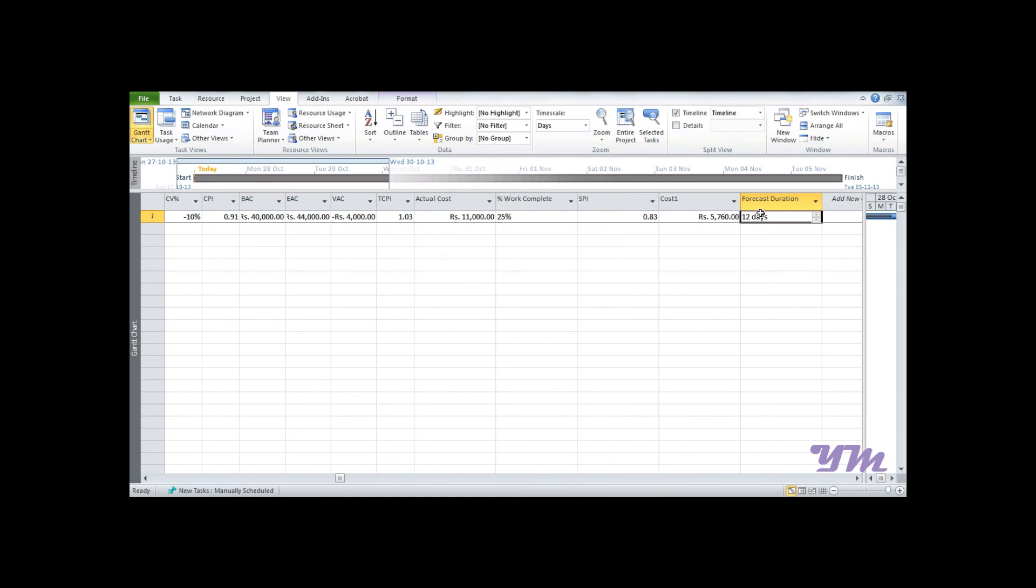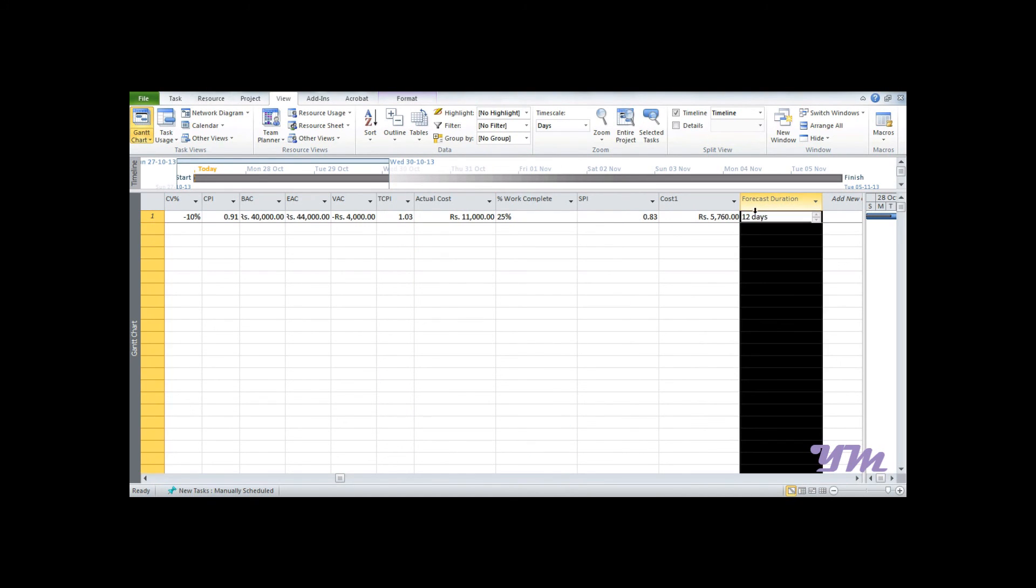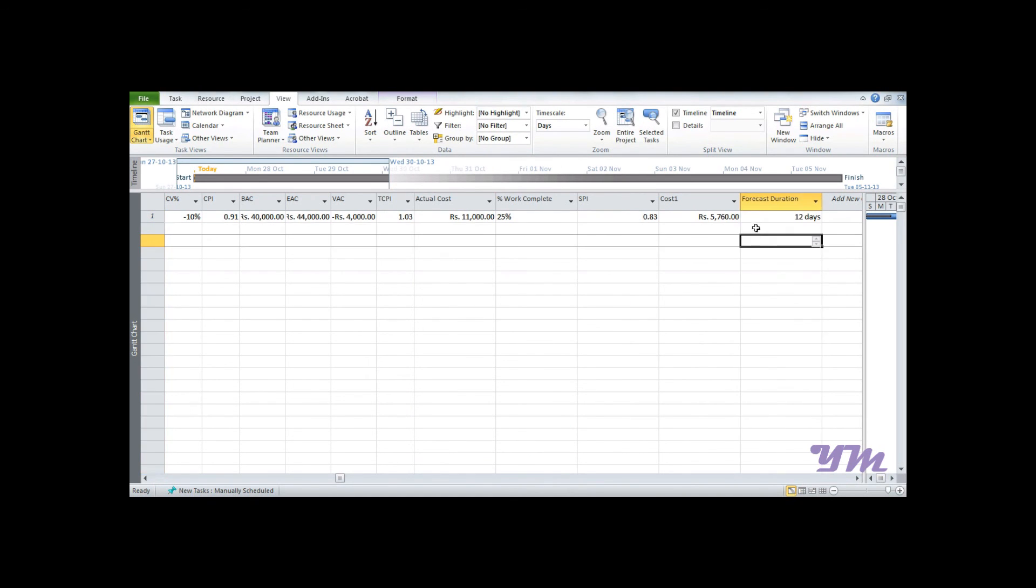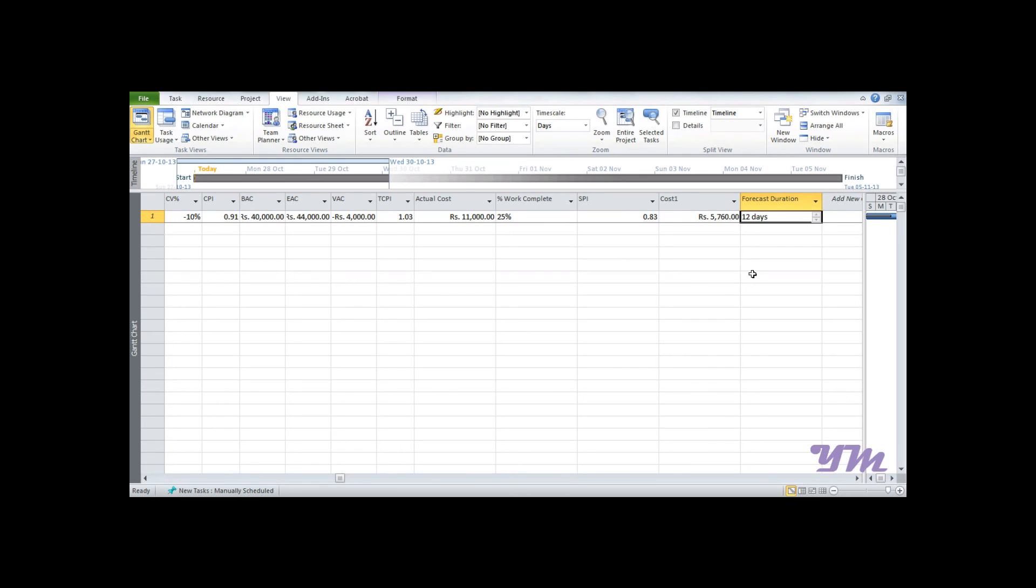Now we can see the forecast duration comes out to be 12 days, exactly as we had seen in the manual example. So this is all about working with project monitoring using Earned Value Concept in Microsoft Project 2010.